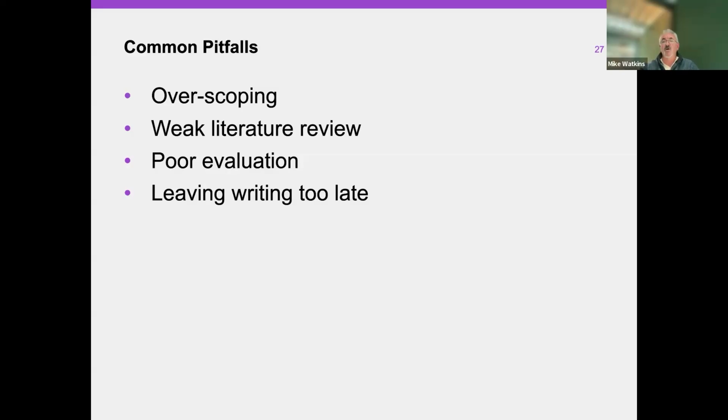So for example, you might have a 12-week window, and depending on how much experience you have and how fast you write, I would say to leave at least 2 or 3 weeks at the end of the project that you are purely focused on your report, because it's not the practical stuff that will get you all the marks. It's the actual ability to talk about your decisions, about the challenges that you had. That's where you're going to get your mark. The practical stuff really is just the vehicle for you to tell the story of your project. So don't leave the writing until too late.